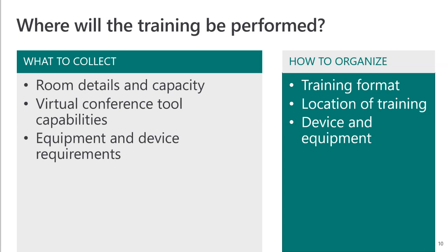or loaner computers, but also consider if there's a difference between the type of device that will be in the training room versus what the user uses on a normal basis. I've seen this before where I'll take the accounting department as an example, and they're normally used to using a desktop computer with a keyboard and a mouse, but during training they were given laptops, and it's not the same comfort zone that those accounting people kind of have in their day-to-day. And so the feel of the keyboard, not having a mouse and having to use a touchpad was very different than what they were used to.